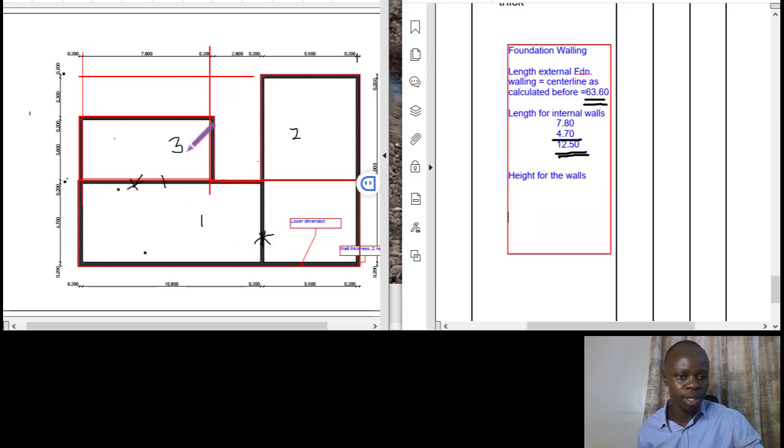This being a basic drawing, and even in more complex drawings, I'll mention that what we are talking about in terms of substructures is considered all provisional, meaning that it's subject to change once the implementation of the plan is being undertaken on site. So it can change at that particular point.